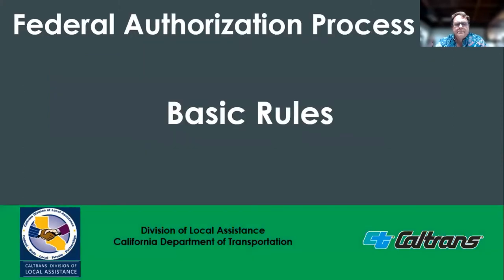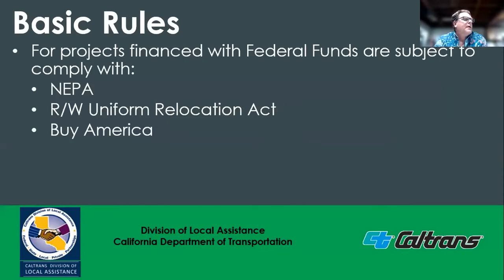Some basic rules. For any project financed with federal funds, no matter which phase, the project is subject to comply with the provisions of NEPA, the Uniform Relocation Act, and Buy America. If $1 of federal funds is utilized on a local assistance project, the entire project is to be covered by the NEPA process. The scope of NEPA is not determined based on funding alone. The NEPA document must cover the entire project, even segments that are non-participating.